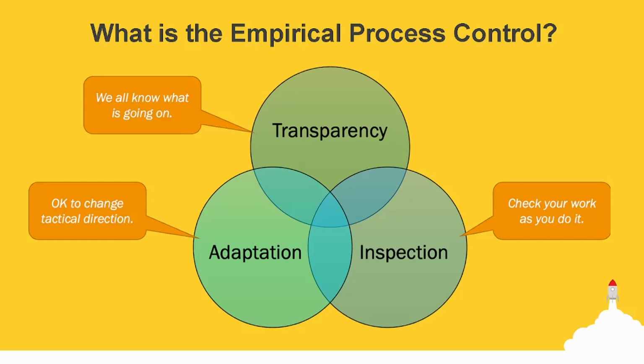Secondly, inspection in this context is not an inspection by an inspector or an auditor, but an inspection by everyone on the Scrum team. The inspection can be done for the product, process, people aspects, and practices, for continuous improvement. For example, the team openly and transparently shows the product at the end of each sprint to their customer in order to gather valuable feedback. If the customer changes the requirements during inspection, the team does not complain but rather adapts, using this as an opportunity to collaborate with their customer so that they can clarify the requirements and test out the new requirements or the hypothesis.